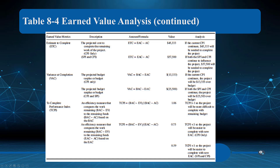Estimate to complete (ETC) is the projected cost to complete the remaining work, calculated as EAC minus AC. Using our numbers, that's forty-five thousand three hundred thirty-three for the typical scenario and fifty-seven thousand five hundred for the atypical scenario. This represents the difference — essentially what we still need to spend beyond what's already been paid.